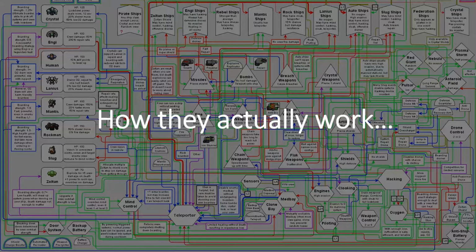It's not only the systems that get complicated, but man, sometimes the customer has years of processes that need to be unraveled and rebuilt. They may have different data models. They may have decisions that they have to make on which direction the data needs to flow. Is it going to be real time? Is it going to be a single direction? Is it going to be multiple directions? What are all the fields that need to be mapped? How the data needs to be converted and changed?